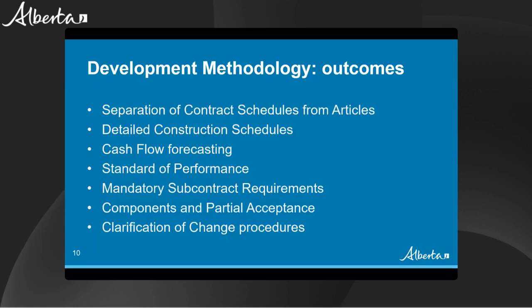Mandatory subcontract requirements. We have heard substantial feedback from the subcontracting industry that more is needed to help Alberta adopt and embrace prompt payment principles on public projects. The newly modernized contracts advance prompt payment concepts, including by establishing some mandatory guidelines for subcontracts on the GOA's public projects. Included in these mandatory subcontract requirements are requirements for alignment of risk issues, such as standards, relief events, good faith obligations, and compliance with applicable laws.